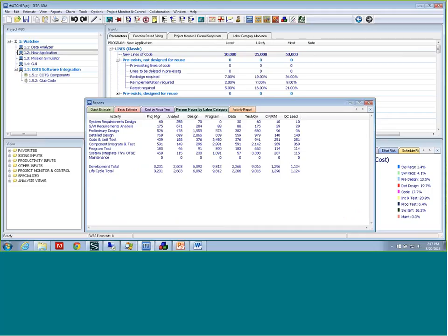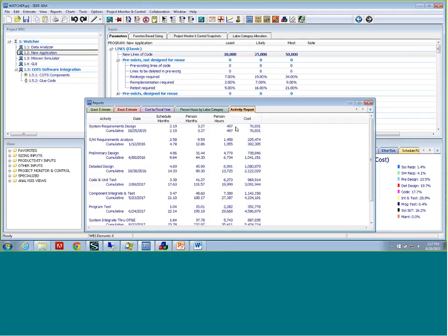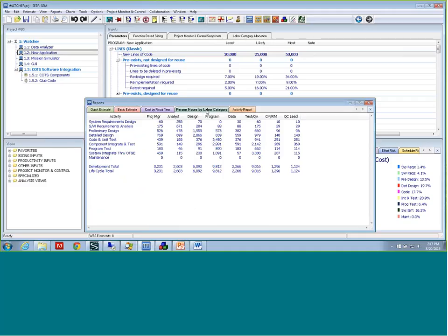So the first thing we do is get the total. Then we break down by activity. So then we go into how much of it is the core development activities, how much of it is the requirements, and then in the beginning and in the back end system integration. And then we break it down by the actual labor category buckets. So you were reading it right, yes. So 60 program management hours are going into that.